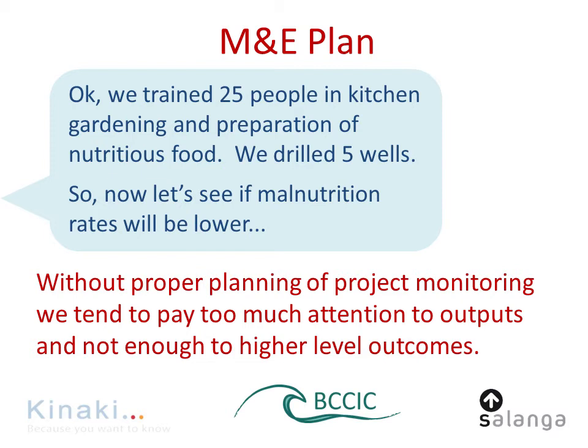Any sort of monitoring of the higher level of the change in knowledge and change in behavior of people, sometimes in reduction of diseases and reduction of malnutrition or increase in food security. These measures should tell the project managers and the project team if they are on the right track. Because in some cases, in fact in many cases, maybe mid-term, halfway through the project, we have to actually decide to change slightly the intervention, because maybe we figure out that there is another factor which affects the malnutrition in this case, and we just didn't respond to that at all.